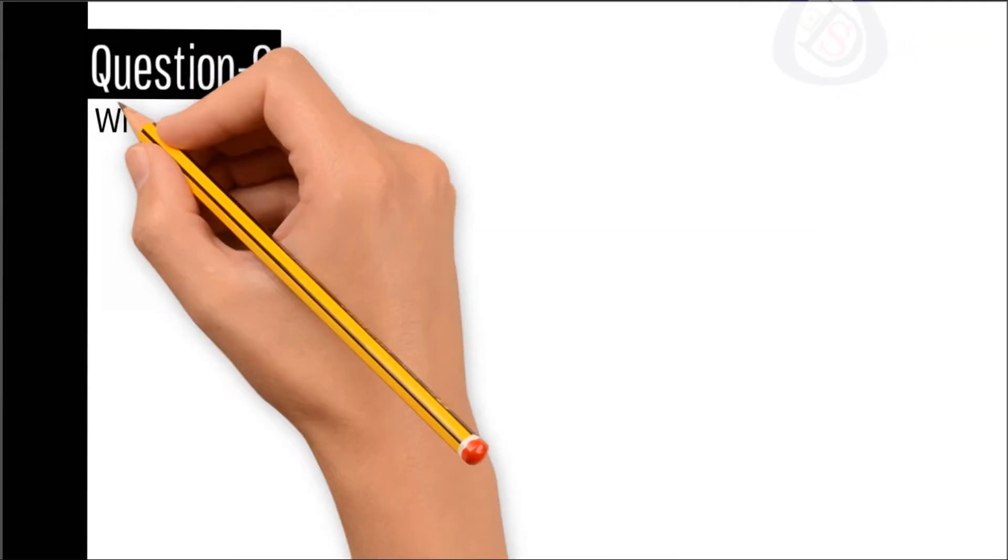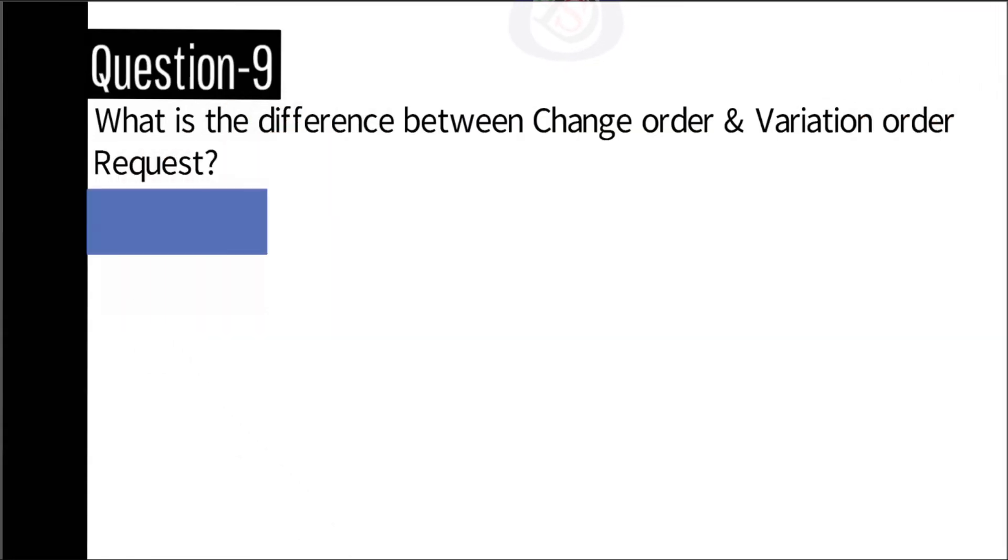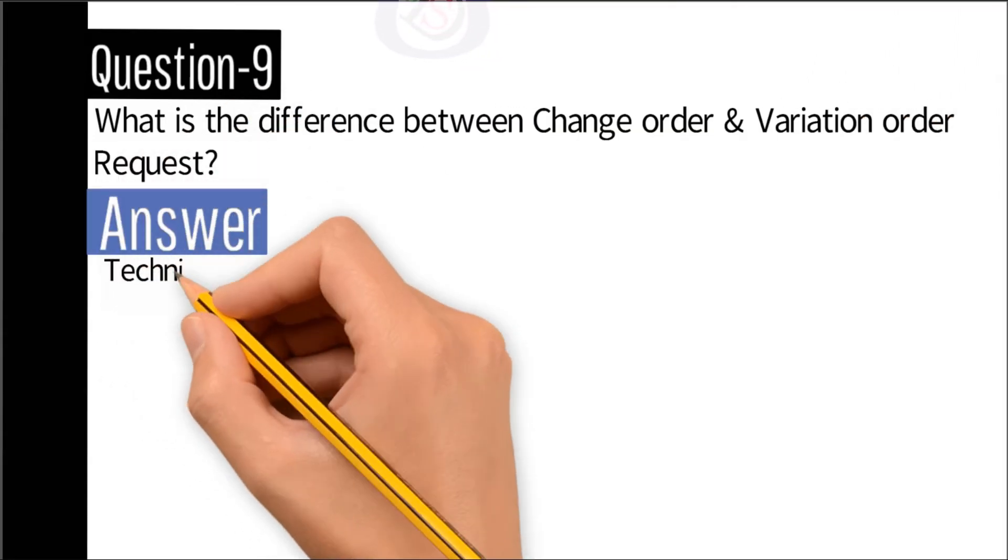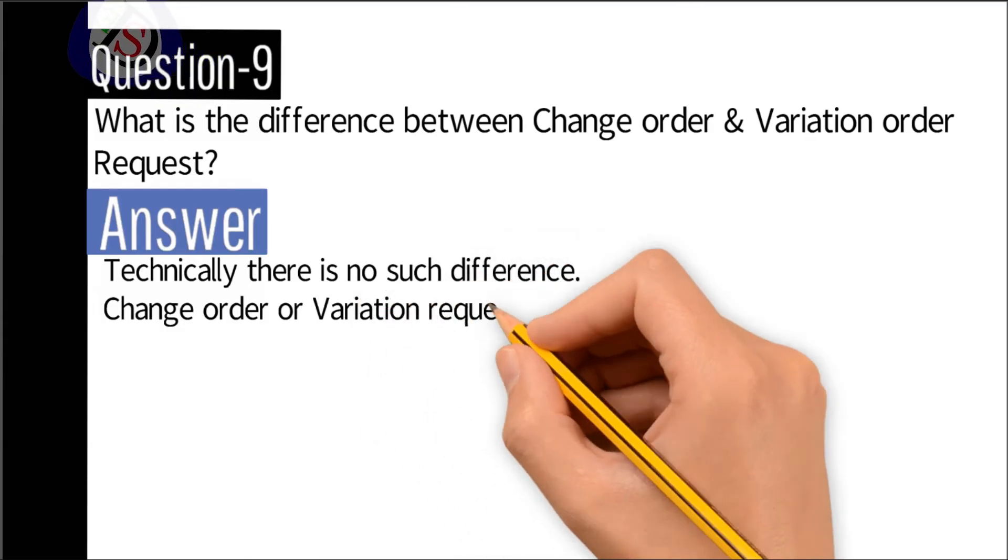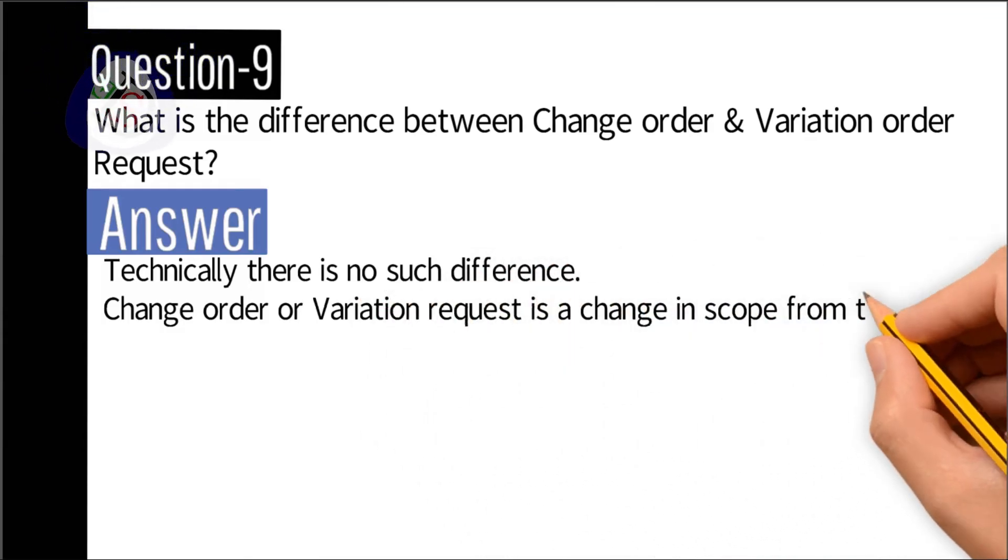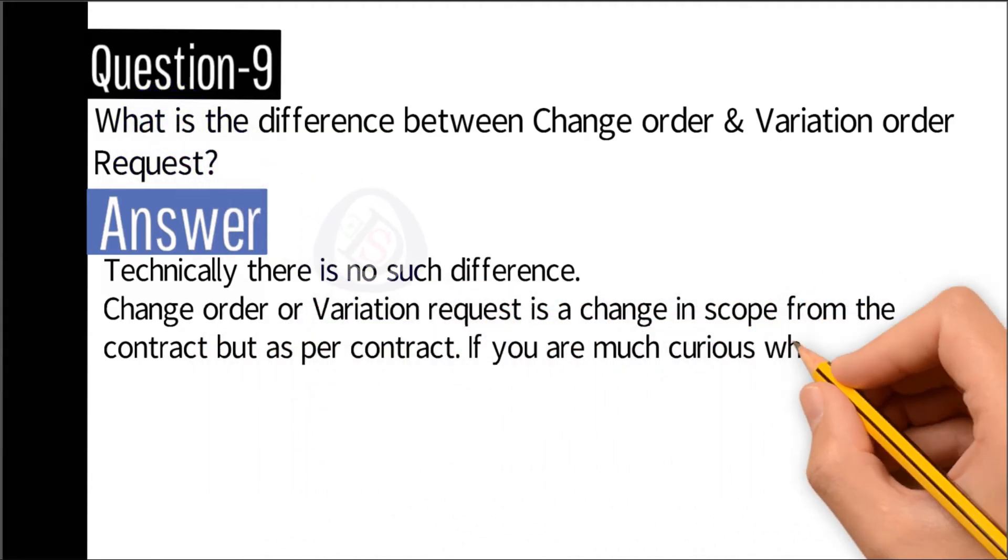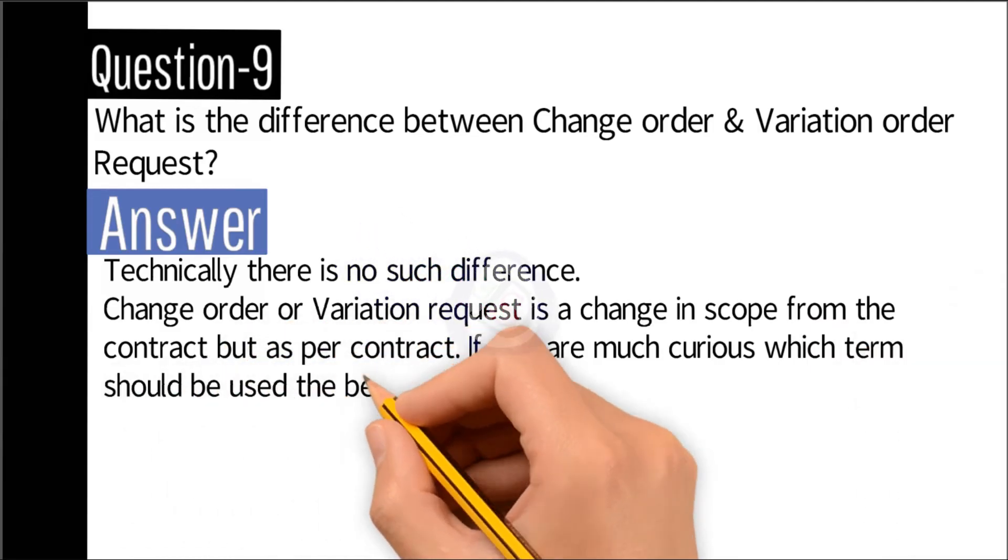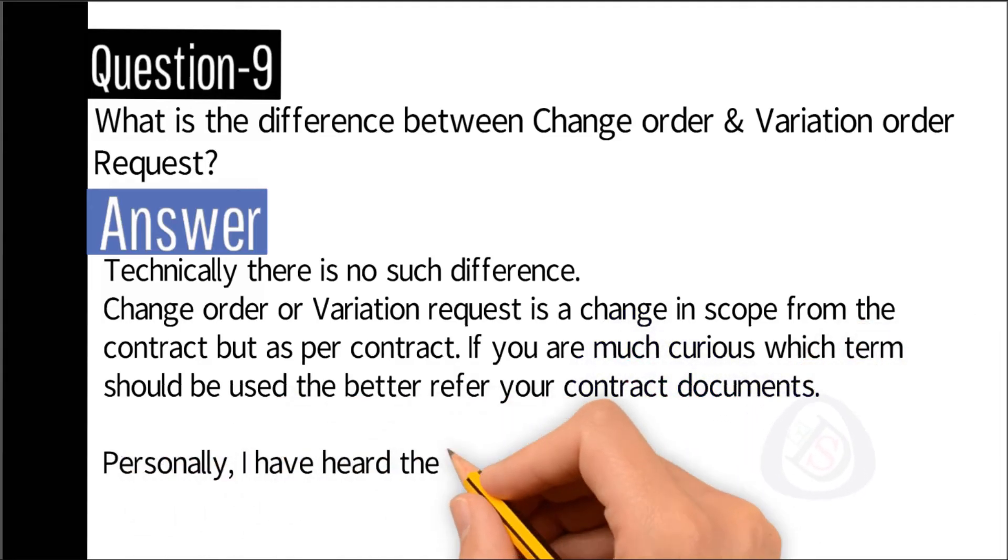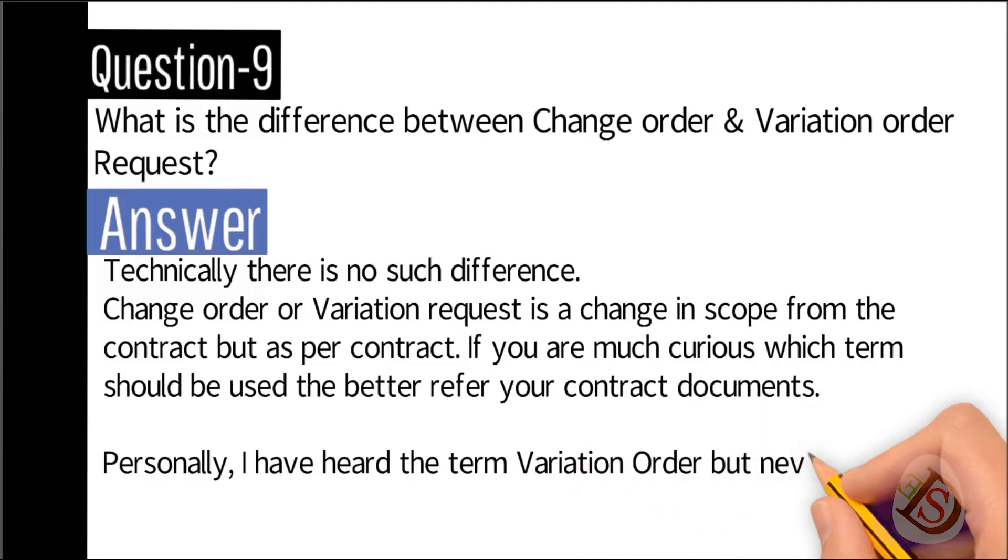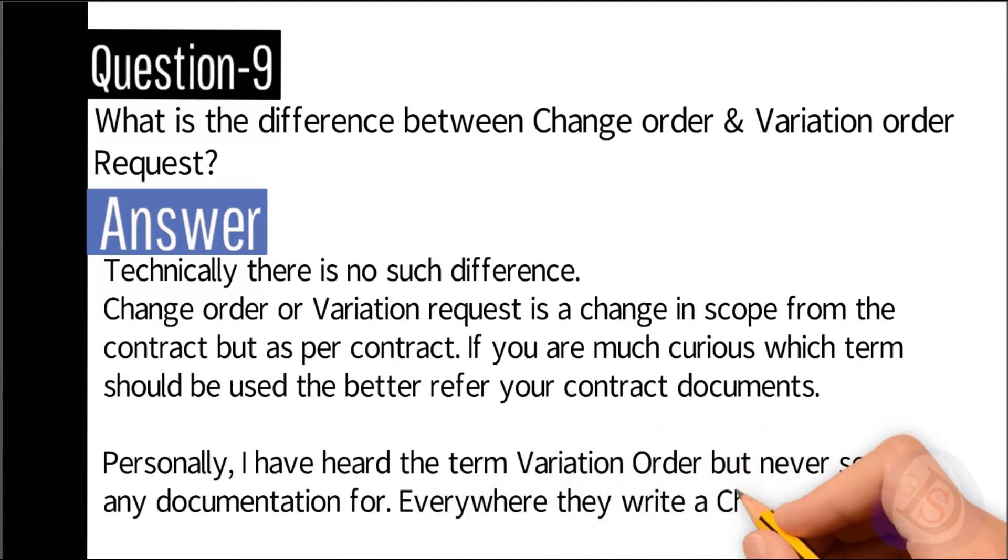Question number nine: What is the difference between change order and variation order request? Answer: Technically, there is no such difference. Change order or variation request is a change in scope from the contract but as per contract. If you are curious which term should be used, refer to your contract documents. Personally, I have heard the term variation order but never seen any documentation; everywhere they write change order request.